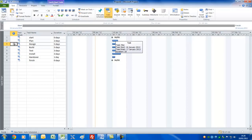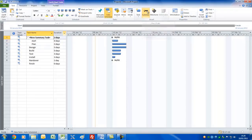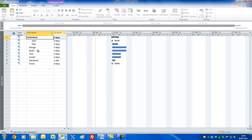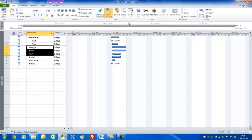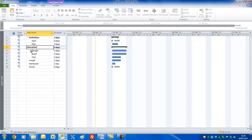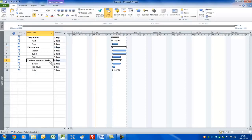For a normal type of project you'd want summary bars to show the different stages or phases. To do that, select the tasks you want underneath a summary task and click the Summary button — it inserts a new summary task. I'll call the first group the Definition Phase, the next group containing Design, Build, and Test the Execution Phase, and the final group the Acceptance Phase.